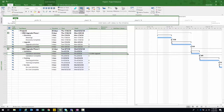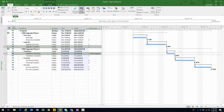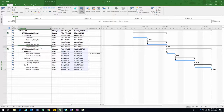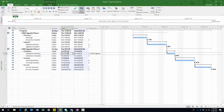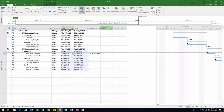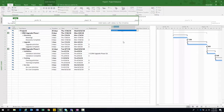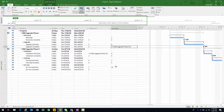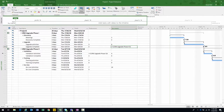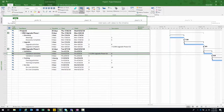The cross-project relationship will be: when Upgrade Complete finishes, the Validation Activities in Phase Two can start. I clicked on Upgrade Complete, held Control, clicked on Validation Activities to select both, then clicked the chain link button in the Task ribbon. That creates the relationship between the two projects. Now in the Gantt chart, Phase Two doesn't start until Phase One finishes — Phase One ends August 6, Phase Two starts August 7. The predecessor column for Validation Activities shows CRM Upgrade Phase One, row 6.